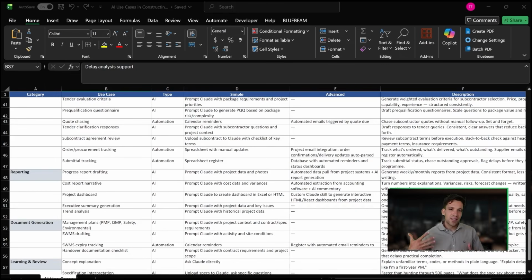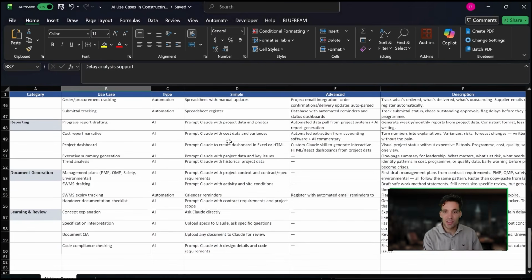Now, in the same way we can create a custom user interface for our Gantt chart, we can also create a custom user interface for any project reports we want. At the end of the day, a project report is just a source set of data like your cost reports, your work breakdown structure with all your tasks, the quantity complete, the quantity remaining, and some custom user interface around it. So using the same process we did to create the Gantt chart, you could also do a custom project dashboard